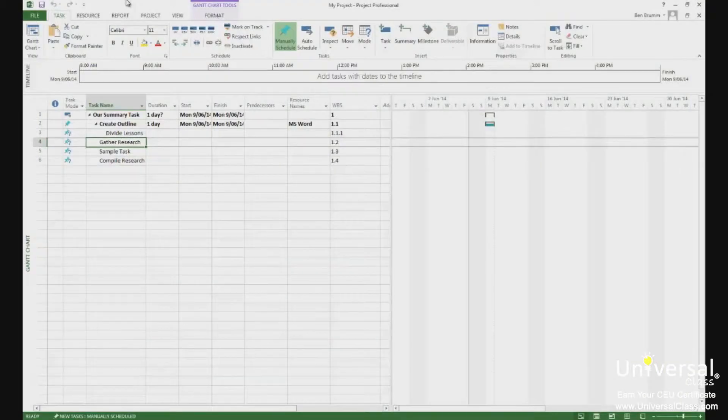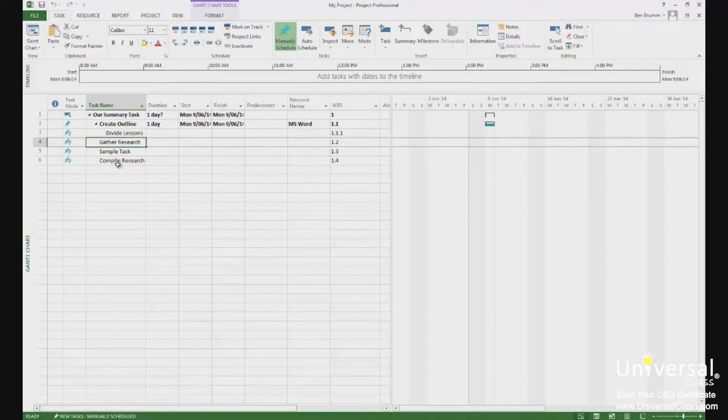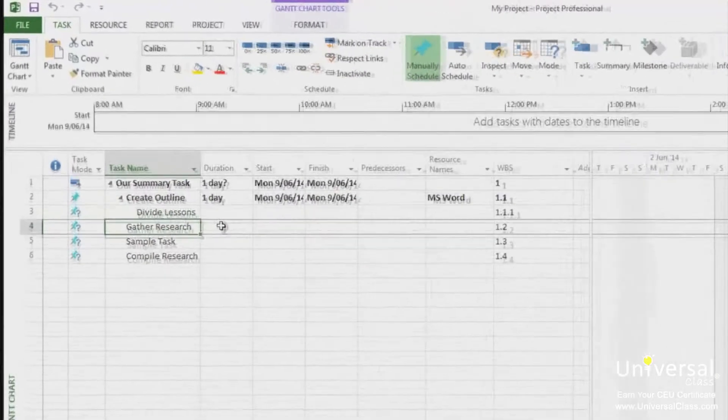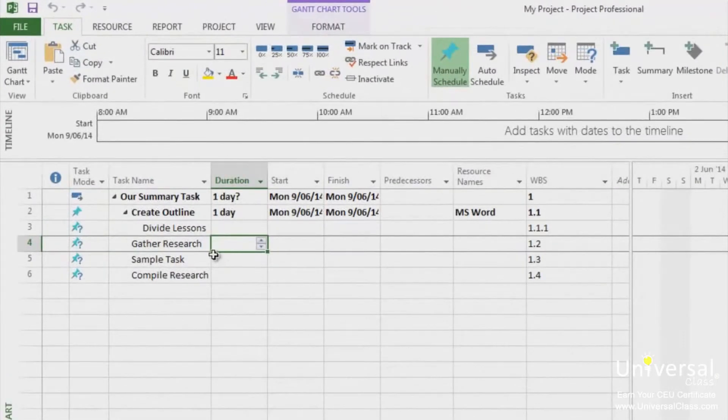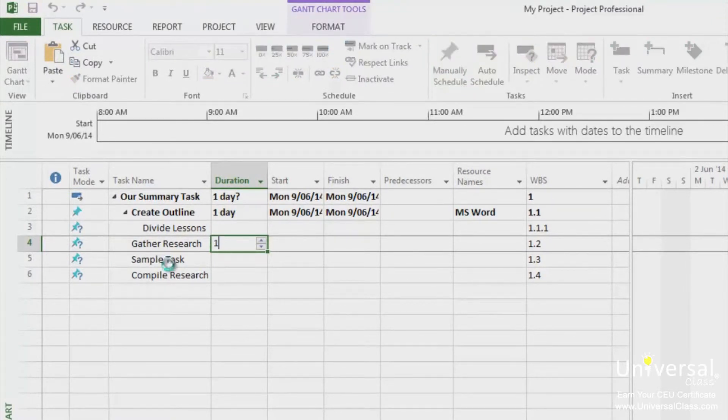Let's learn to create a finish to start dependency. Make sure you're in the Gantt chart view and the two tasks you want to link are both visible. You'll also need to make sure that tasks actually have a duration. So if you're using this example, enter a duration for one day for each of these tasks. You can do this by typing one into the duration box and pressing enter.